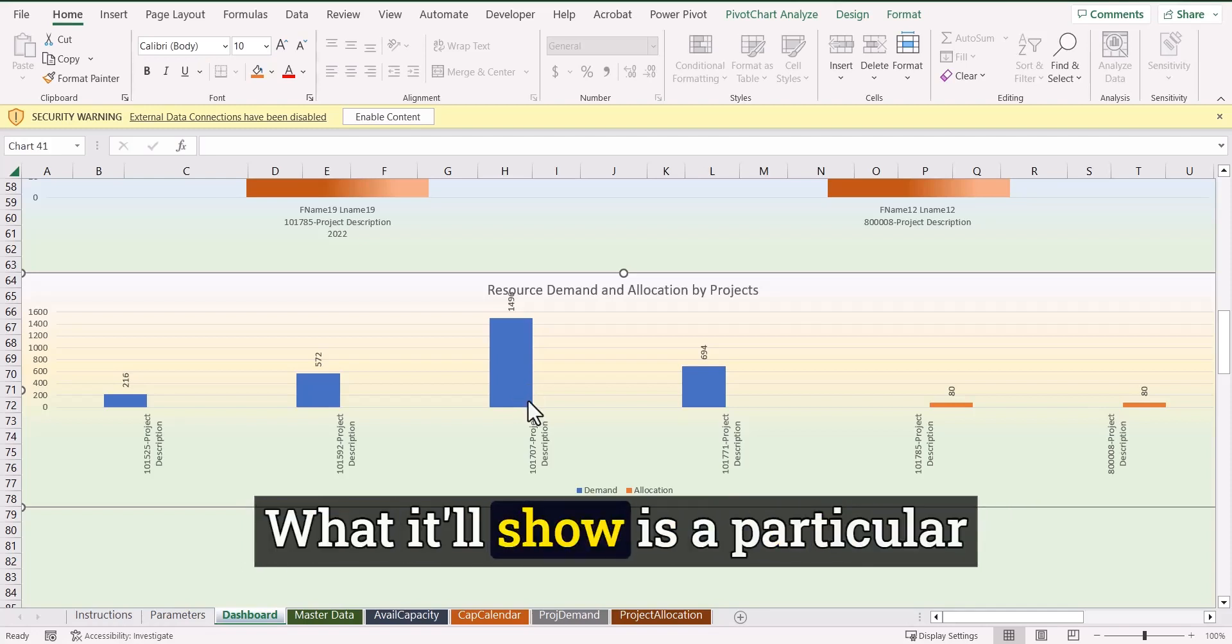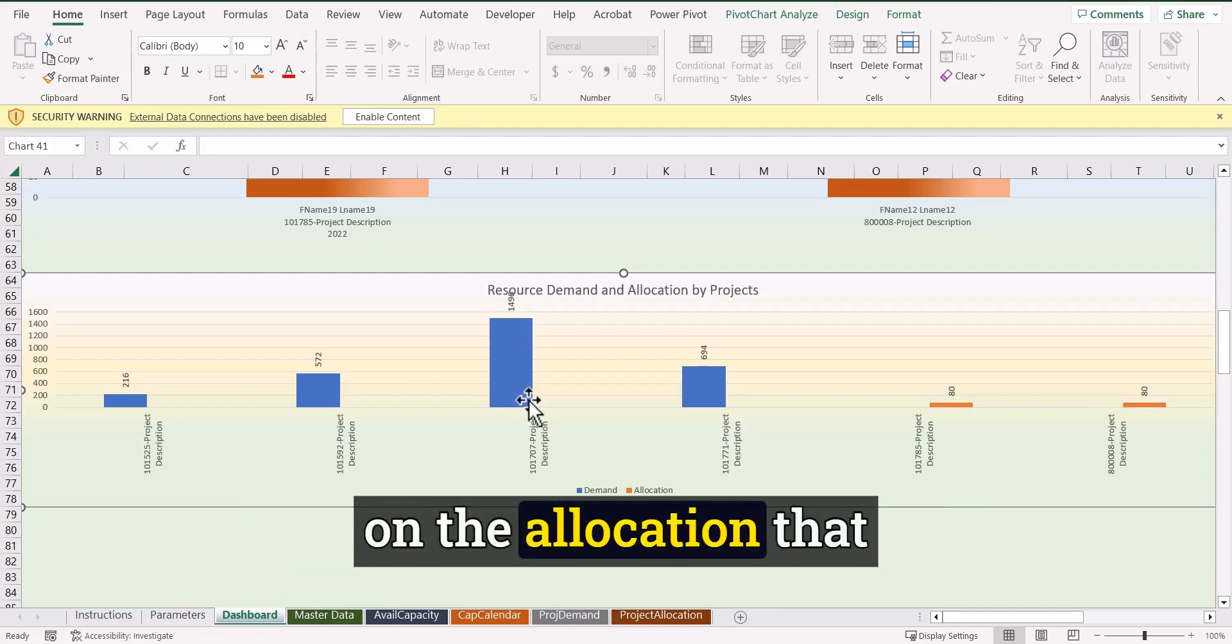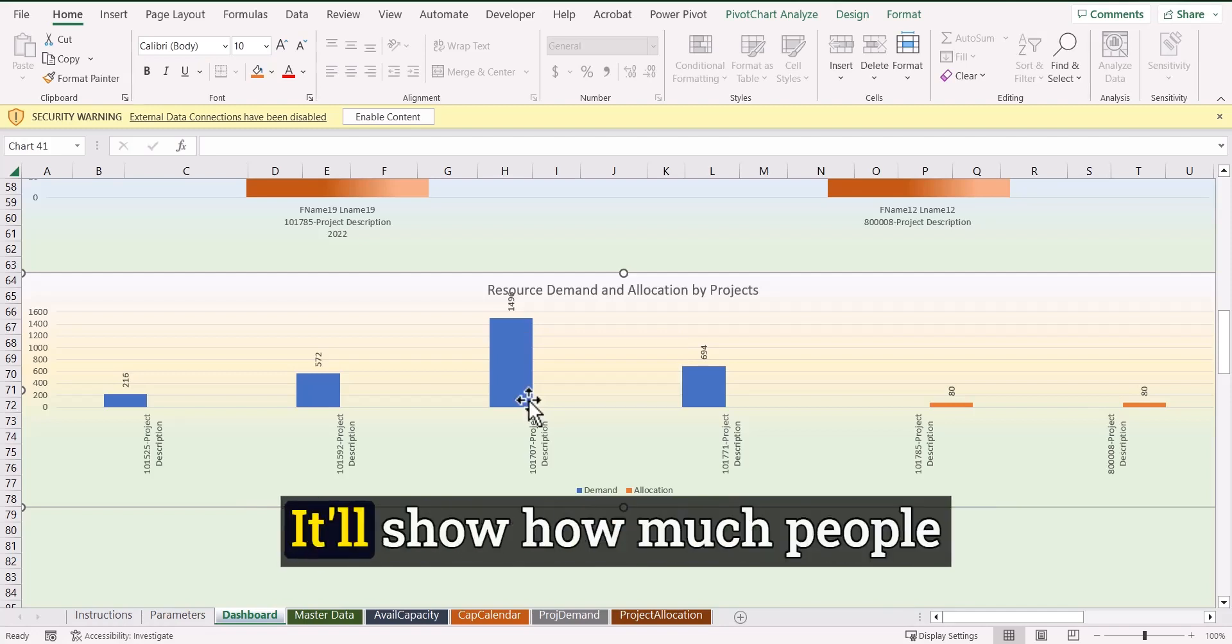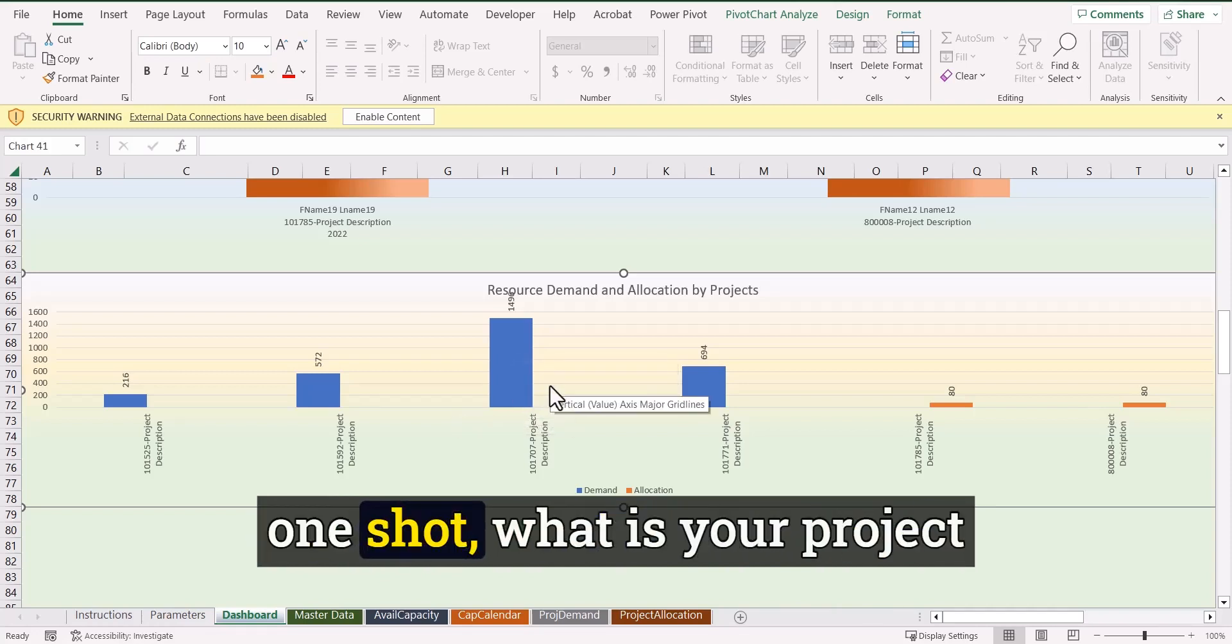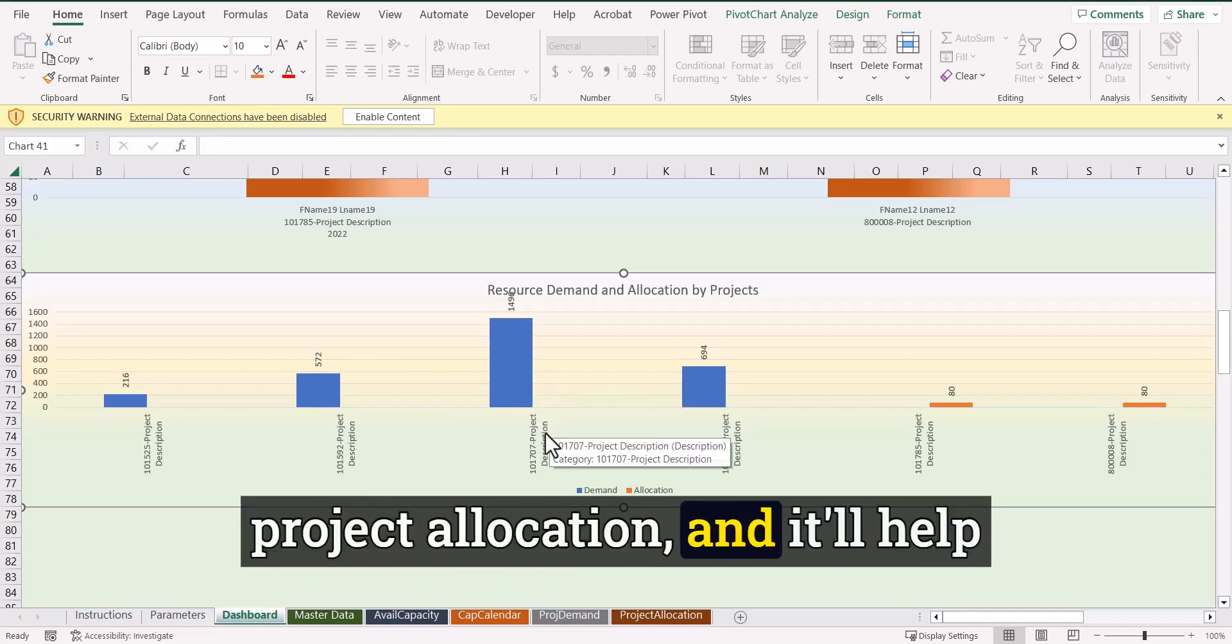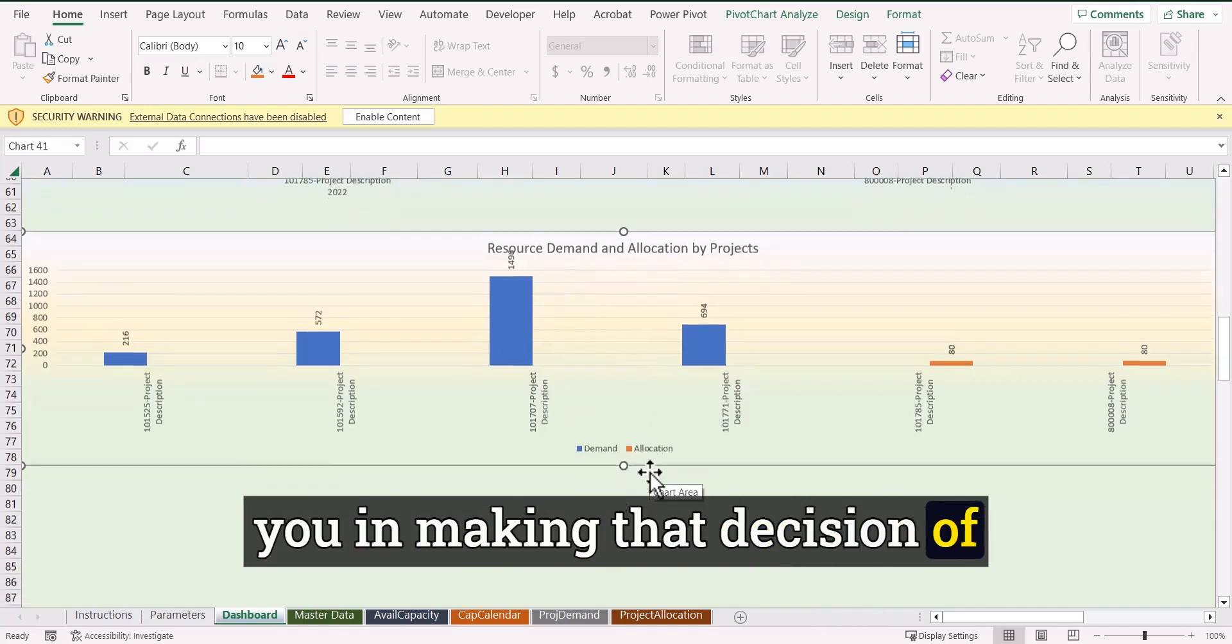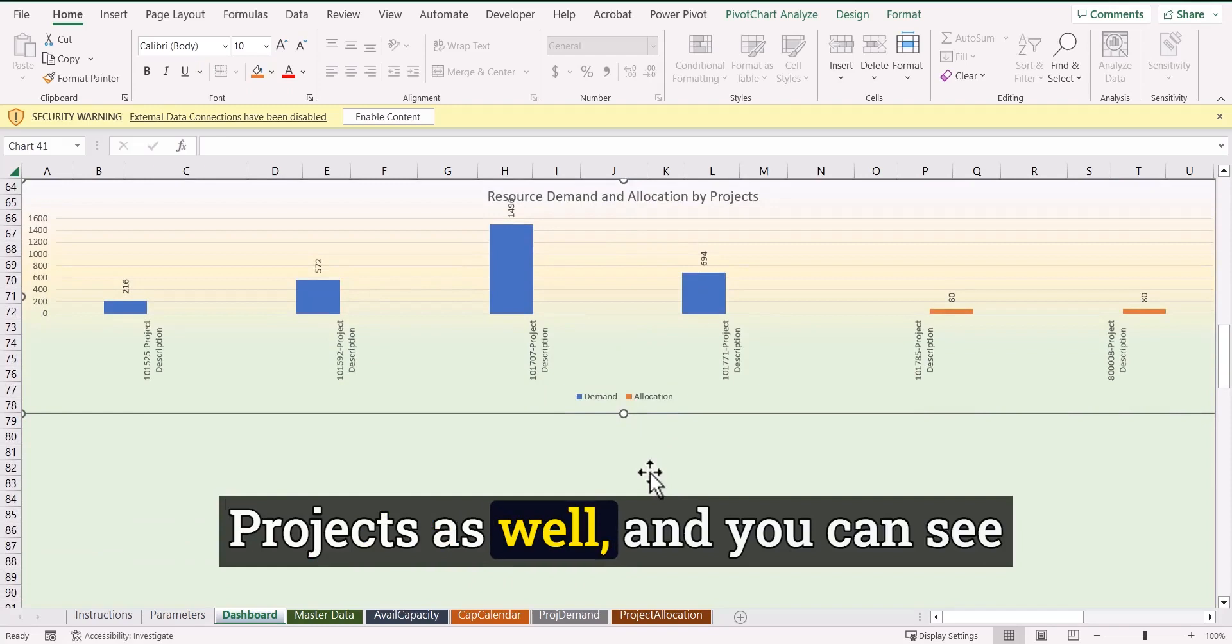What it will show is a particular project has certain amount of demand. And then based on the allocation that you have done to people, it will show how much people are allocated to each project. So that's why it will show you in one shot, what is your project demand and what is your project allocation.